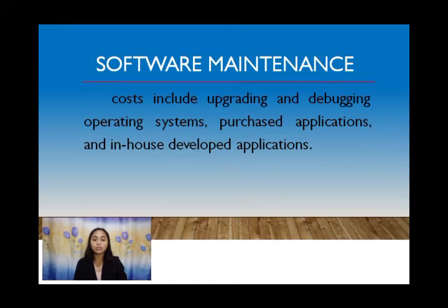Software maintenance includes optimization, deletion of discarded features, error correction, and enhancement of existing features. As these changes are essential, a mechanism must be created to estimate, control, and make modifications. Software maintenance must have an accurate plan during the development cycle because maintenance takes up about 40 to 80% of the project cost, closer to the higher pole. So, a focus on maintenance lowers your cost.